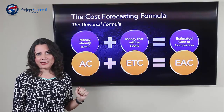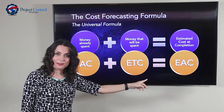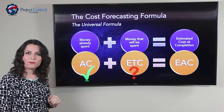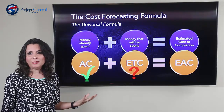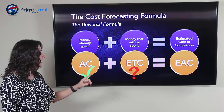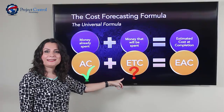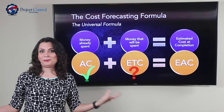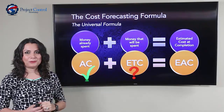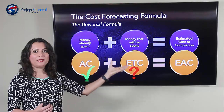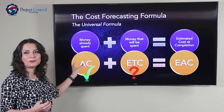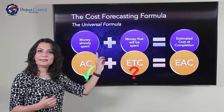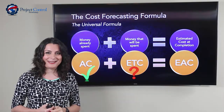We already have Actual Cost from our financial systems — that's the money we have spent. So if we can come up with the formula for ETC, Estimate to Complete, we can easily calculate EAC. It's just a matter of adding Actual Cost to our ETC. So as long as we can determine ETC, we have our EAC.